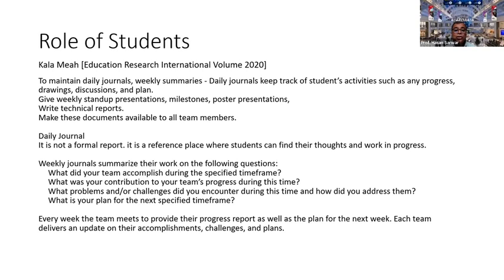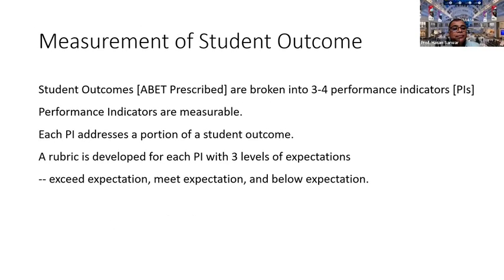What was your contribution to your team's progress during this time? What problems or challenges did you encounter during this time, and how did you address them? And what is your plan for the next specified time frame? Every week the team meets to provide their progress report as well as the plan for the next week. Each team delivers an update on their accomplishments, challenges, and plans. So this is what the students are doing every week.